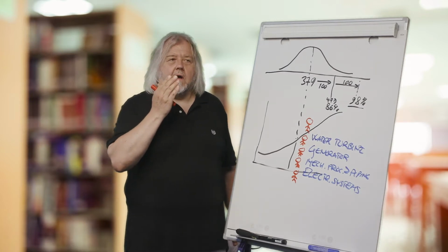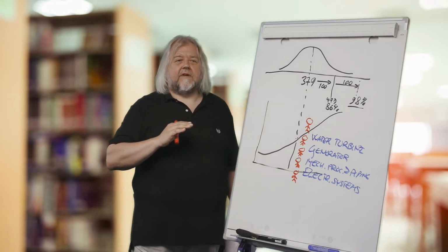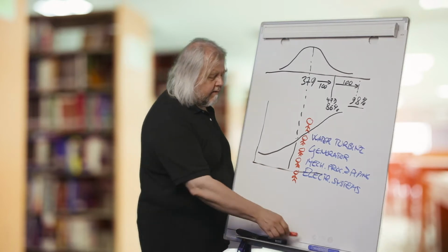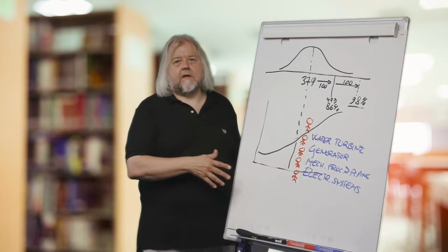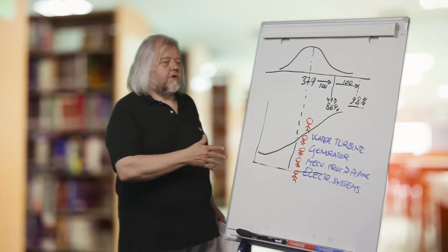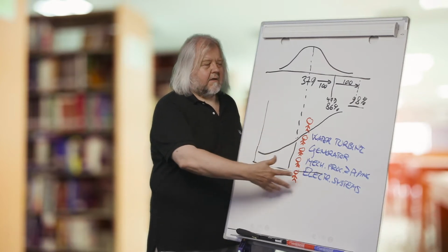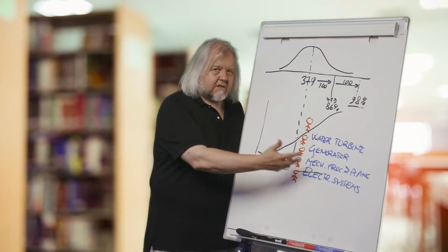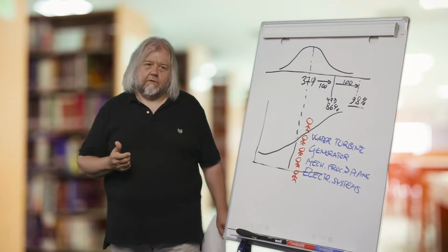So what I try to underline here is that this method is really a group work method. It doesn't take more than 1 hour or 1.5 hours. Just take people into the same room and use these quantitative estimates to facilitate the discussion and understanding about risks, and really make some real decisions about what to do with those risks.